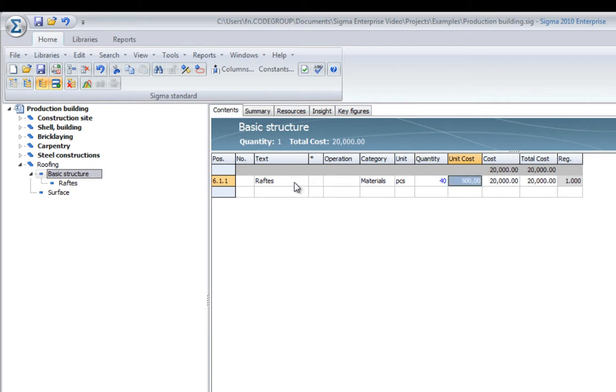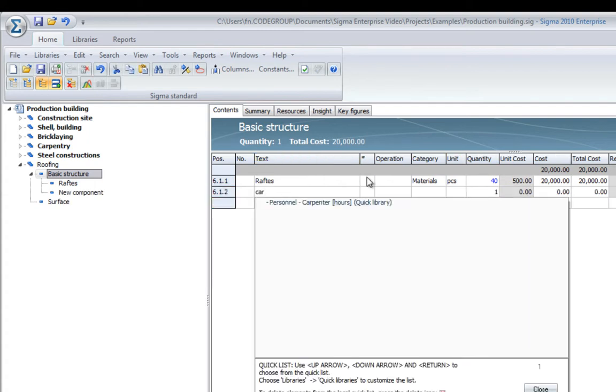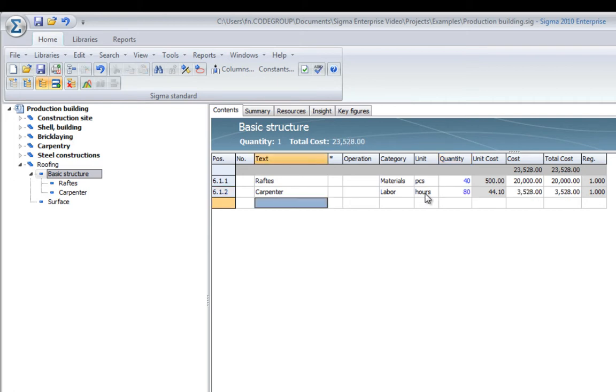Then I could add a carpenter and type it in, 40 pieces by 2 hours. What you see is that everything is automatically added up. So, my $23,528 is now the cost of my basic structure.